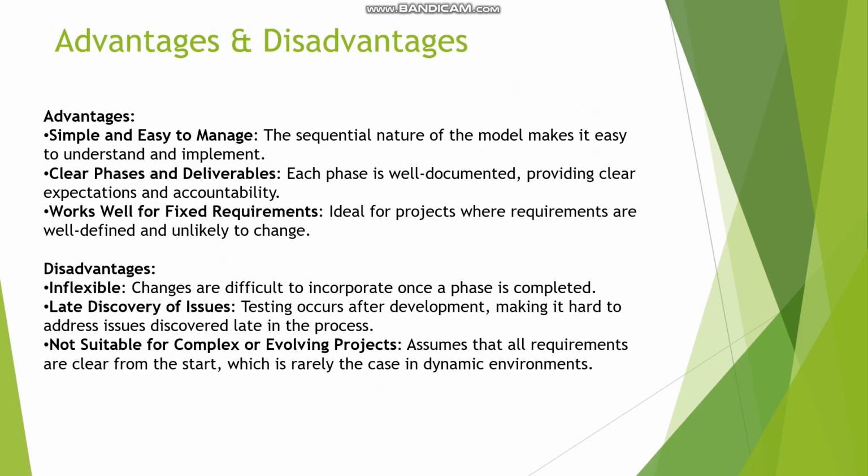What are the disadvantages? Inflexible: changes are difficult to incorporate once a phase is completed. Late discovery of issues: testing occurs after development, making it hard to address issues discovered late in the process. Not suitable for complex or evolving projects: it assumes that all requirements are clear from the start, which is rarely the case in dynamic environments.